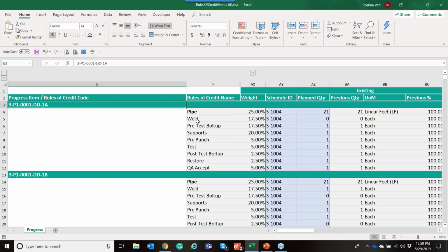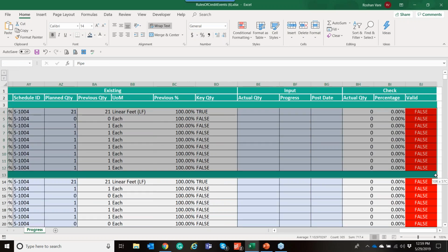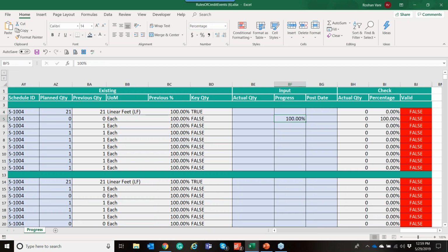And so now you've got that same piece, that scope, you've got those items, you can bang in, just like I showed you, 100% complete for which week you want, and then it's doing data validation right here. You can also input this based on quantities installed. So in this example, we have one each that was done on a takeoff. So you can say one, the week you're updating for, and it'll tell you it's going to import 100% into the system in one widget.